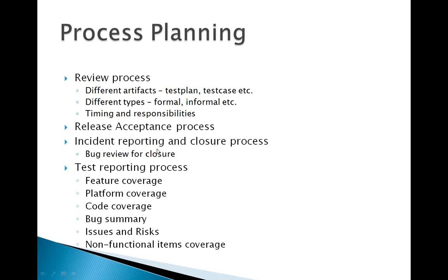Where do we use the master and level test plan specifically? So the master test plan is an overarching plan for your application, right? For example, I shared with you the browser testing. You can have an overall plan for testing the browser, but there are subsections to it, like installer, security, performance, or various bigger features like bookmarks. You need to have detailed test plans for that. The template would be the same as for the master test plan, and you can skip things which are not needed, as given in the IEEE 829 standard.